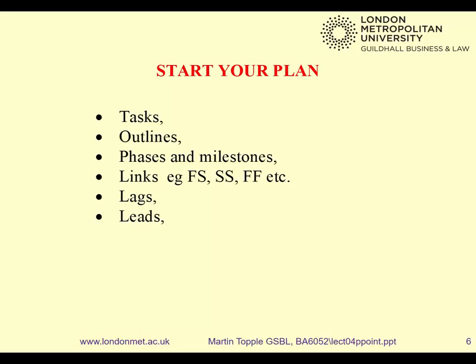Now, a lead is rather more complicated, but what that means is this task finishes, and 3 days earlier, this other task would start. I can't think of any sensible applications of that, but maybe if some of you are good chefs, you might be able to think of something along those lines. But certainly, not everything has to finish and then immediately start. Sometimes finish and a few days later start. Sometimes finish and a few days earlier start. Both are possible in the software.